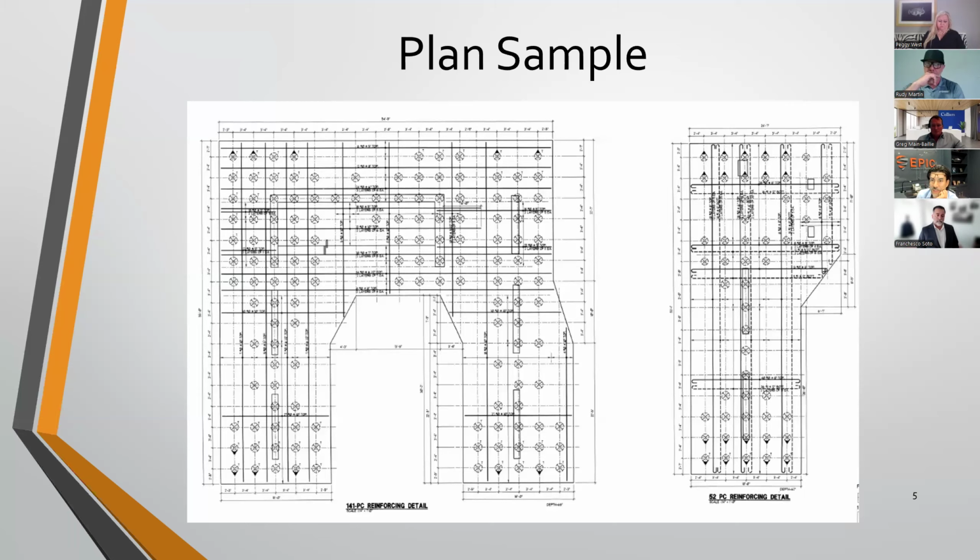Whether you're bidding out to, and I'm just using bondability as probably the easiest gauge of contractor sizing, a contractor bondable to 5 million, a contractor bondable to 10 million, a contractor bondable to 50 million. The 50 million contractor is going to be a bit of the whale in the room. They're likely a bigger firm with a lot more overhead, so their general conditions might be greater compared to the $5 million bondable individual. Understanding that is certainly beneficial.